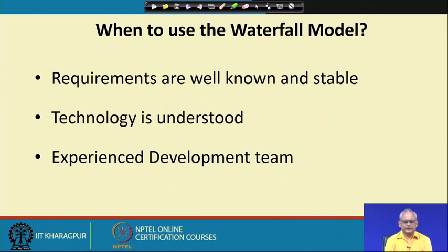The developers are experienced in accounting software technology, well understood, the accounting requirements are almost stable, and then in this case a waterfall model will be a suitable model.